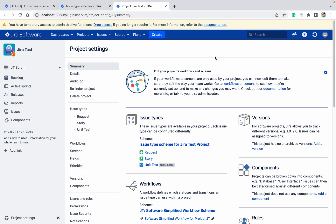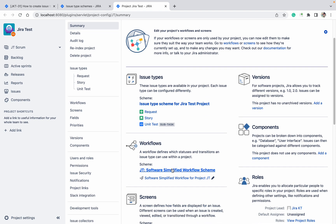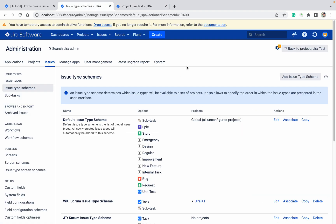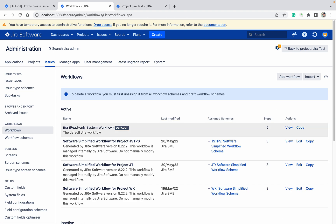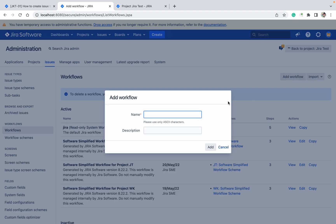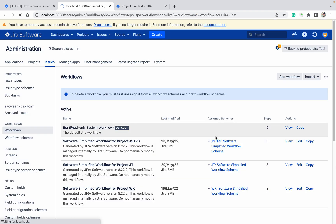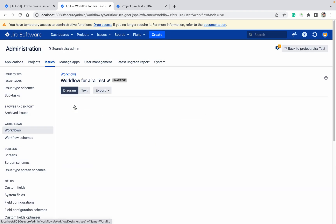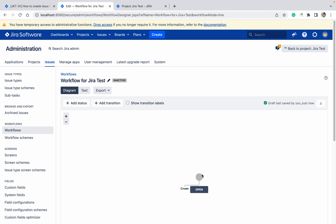Now I will create a workflow and workflow scheme for the project. Currently another workflow and workflow scheme is being used — I want to create a new one. To create the workflow, go to the workflow section where existing workflows are listed. Click to create a new one, give it any name — I'll name mine 'error test' — then click Add. The workflow is created; you can see only one status exists.